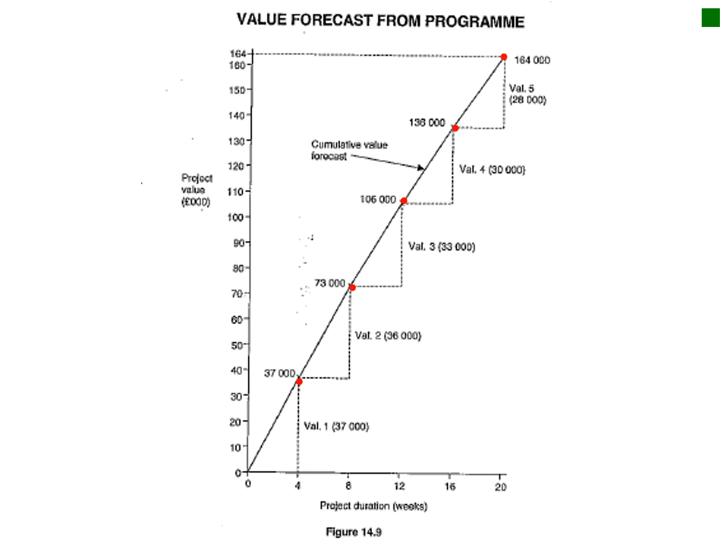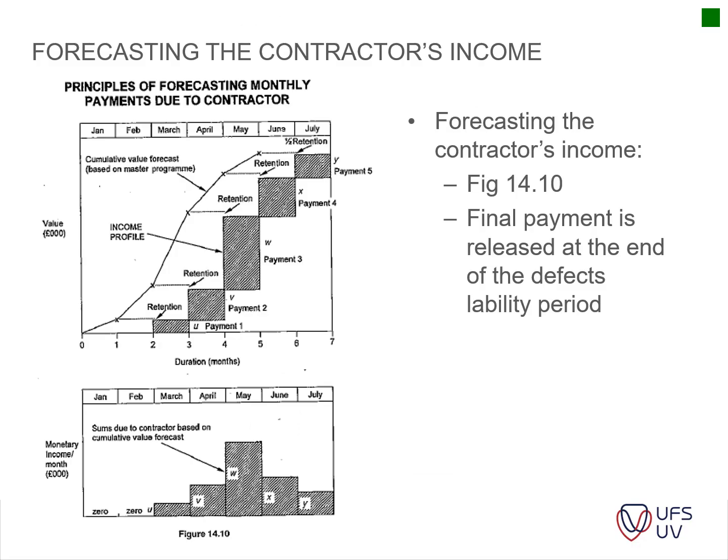So your cumulative value forecast. Remember, I've been talking now about your cash flow and outflow and so on, but this is actually applicable to your cumulative cost of the project. Okay, you'll understand that a little bit later. So you've got your value that I've spoken about now. We've done the value forecast, but now we're getting to a point where your actual cash flow inflow is only received after the first month.